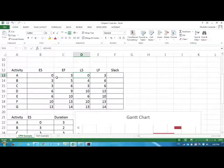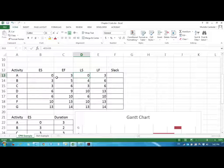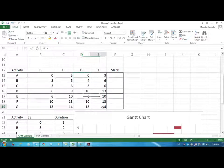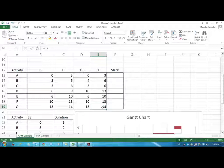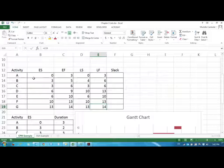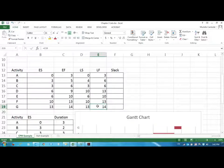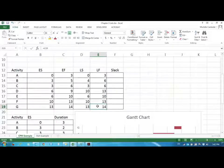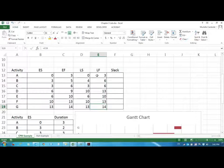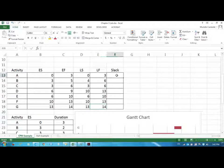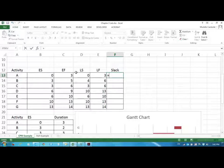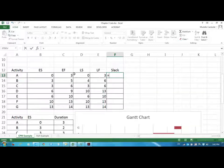So what we have is for some activities we see that the early start and late start values are the same. But for some early start and late start values are different. The same thing for the early finish and late finish. So if I can start at a different day and finish by the same time, that means I have some flexibility on that activity that I could just delay that activity for a while. It's not going to affect my completion time. So which activities have that kind of flexibility that we could measure using the slack.